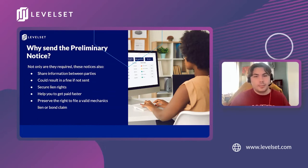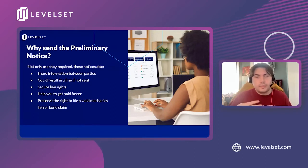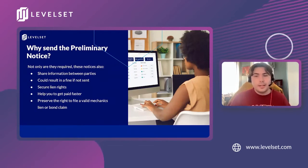And finally, sending a preliminary notice is required in order to preserve the right to file a valid mechanics lien or bond claim in the chance that you're not getting paid for the project. Since this one document can be sent at the beginning of the job, you can basically create a safety net you can fall back on by filing a valid claim if you're not paid. And anytime you encounter slow payment, this is great insurance for later.